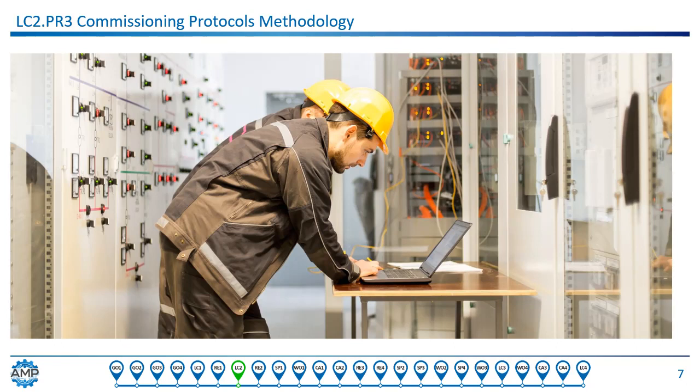For larger or more complex projects, commissioning is generally performed in stages, beginning with installation qualification, called IQ, where equipment is set in place and connected to the utilities and process lines. This work is inspected and accepted before beginning operational qualification, or OQ, where the process parameters, the safety equipment, and controls are verified to work correctly. Then finally, production qualification, or PQ, where the system is tested under actual production conditions. Each phase validates with a different focus, with the final desired outcome of a process that is fully functional for intended operations and aligned with all design specifications. Commissioning consists of detailed test plans that ensure acceptance values are achievable and sustainable, and commissioning outcomes must be documented and verified.